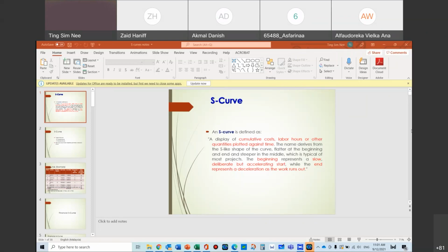There will be cases that come under budget, like you design and everything, and it only costs 3.9 million. The client will say, after the 5 million budget, why don't we use it? So they will get you to expand the design. I've seen this with the drain project that I was telling you just now. It was a 4.5 million to 5 million kind of budget. We ended up designing only 3.9 million. Honestly, this is a real example. Then the client said, we still have money, so why don't we expand it upstream another 1 kilometer? Can you design that?